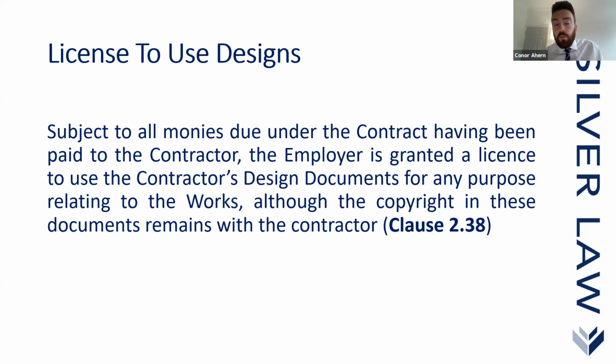Again, this is an area which is commonly amended. Some amendments don't even require all of the money to be paid by the employer to the contractor, and other amendments see the employer doesn't get the license. He actually owns the copyright, because what the employer doesn't want is just to have a license to use, and then later on down the line discover that he actually needs to have the copyright in the documents for whatever reason. The contractor should give them over easily, but he's going to follow his contract. If he doesn't have to, he probably won't, and he's going to want to be paid a sum of money in order for the employer to get the copyright at a later date.